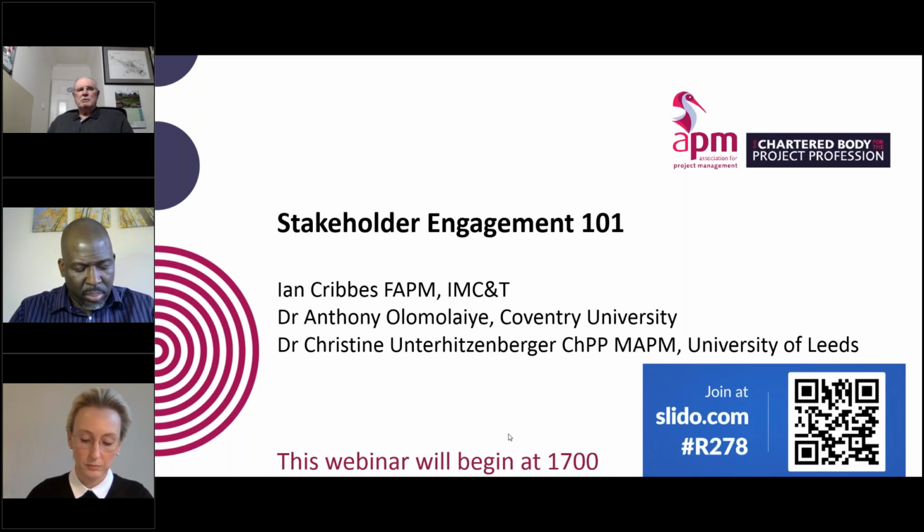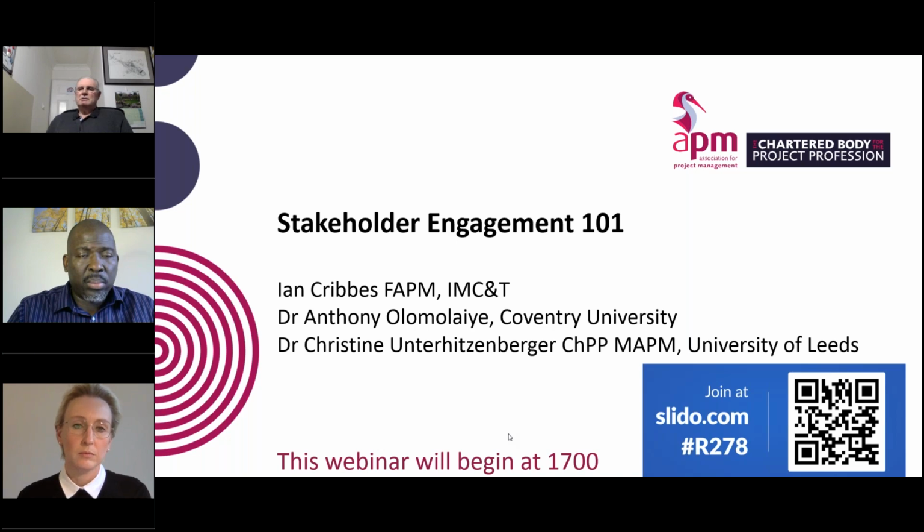And the more open and honest you are with each other, and I really think that sadly in the past, stakeholder management, as it was called, and now stakeholder engagement, was almost a tick in the box for project managers. They did their stakeholder engagement, their stakeholder management plan, they got all the ticks in the box, they put it in a book and they put it on the shelf, and it gathered dust for the life of the project, because they'd done it. And it's the same with the communication plan, which is built into stakeholder engagement. They did a communication plan, it got signed off, it went on the shelf and got buried in dust.